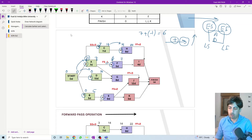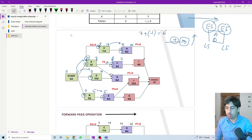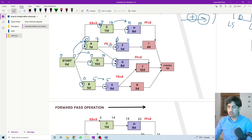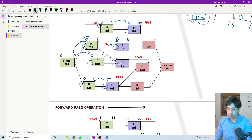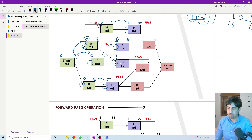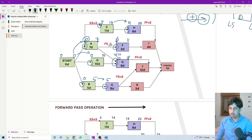We transfer the five directly for the next node. For activity G we have two options — two arrowheads coming in. We calculate from both directions: from the first it's either seven or ten (finish-to-start), so we select the highest which is ten. Ten plus eight equals eighteen. From the second direction: five plus nine equals fourteen.